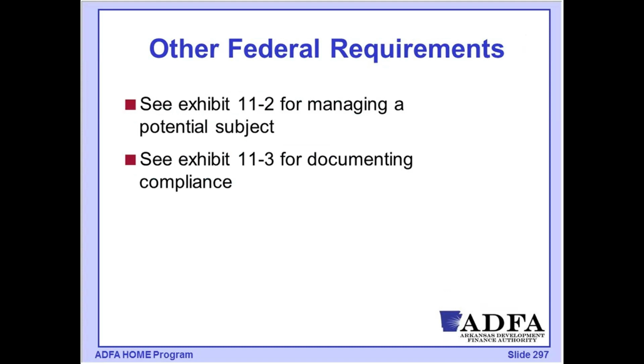We'll mention later when we go through the other federal requirements that we have a layering of other federal requirements which have an impact on managing our construction projects. We could have Davis-Bacon wage rates. We'll have environmental review. We might have a project under the Uniform Relocation Act where we were either permanently or temporarily displacing individuals.